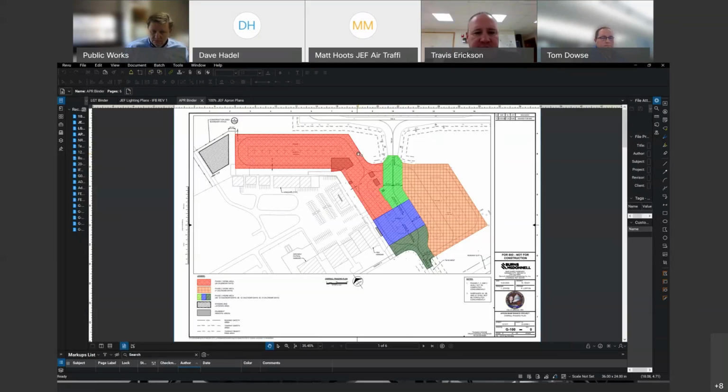Yeah, hi, this is Travis Erickson with the Missouri Department of Conservation. Can you guys hear me? Yes, we can hear you. Yeah, I had questions and input on that shaded green area. That's going to cut off the access to the tenants down Charlie completely, correct? Correct. Okay. I know you said 20 to 26 days. Is that correct on the time frame? For that area, that's phase 3C. That's about 8 days, calendar days.